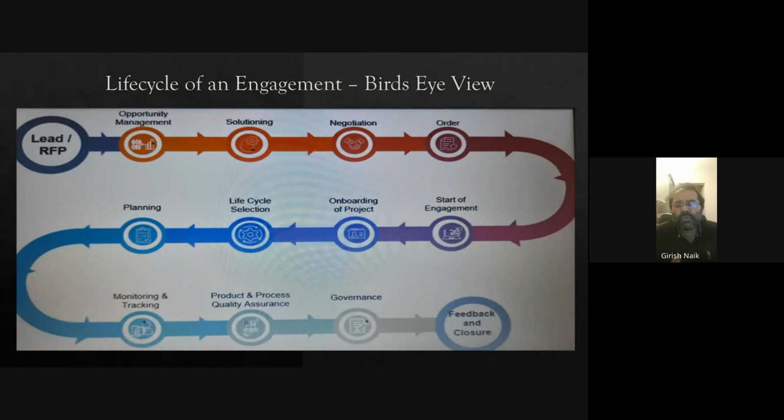I will do a root cause analysis using the required methods. We have some standard methods called the 5Y method and fishbone method kind of thing. I will do an RCA, root cause analysis. I will come up with the corrective actions and preventive actions, the critical part in the software assurance process, right? So I will fix that so that in the next coming week, next coming month, I am in good shape on those metrics. Each metric, whatever I told previously, will be reviewed, then analyzed. If I'm not doing good on that metric, it will be fixed, right?